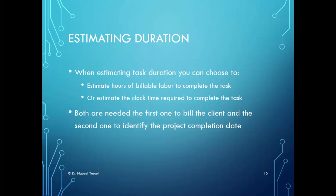When estimating task duration, you can choose to estimate hours of billable labor to complete the task, or estimate the clock time required to complete the task. In many cases we need both — the first to bill the client, and the second to identify the project completion date, which can also serve as historical data to improve duration estimation in future projects.